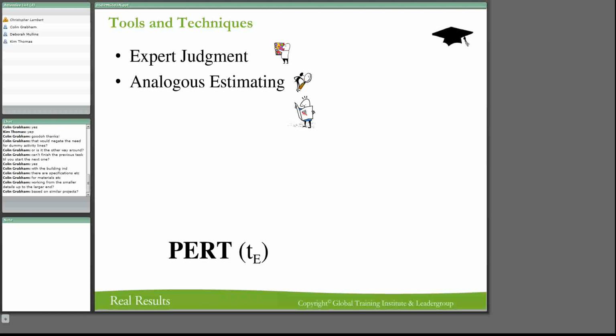If I wanted to do it for 8, all I had to do was double up on the ingredients and double up on the time, probably. Not quite double up on the time if you're baking, but recipes are good ones for estimating. Now, you would do the same thing if you have done these projects before. If this project had been done somewhere else and you have a template for it, you would utilize that. Contractors are very good people to bring into your team to help with this, because they've probably done it before and they can bring it in, and with a few calculations you would be able to estimate very accurately what your estimate is going to be.